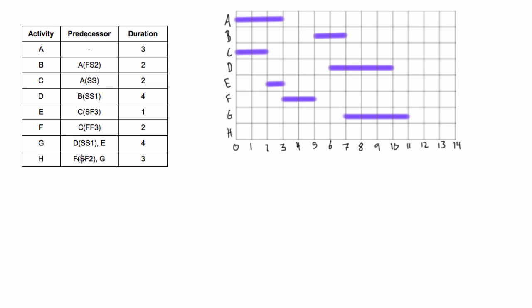Activity H also has to satisfy two things. It depends on F with a start-to-finish relationship of two. So we find the start of F, and H could finish two days after that - so that's one potential finish point, and with three days duration we count back three for one potential start. But H also depends on G with a regular finish-to-start relationship, so it can't start until G is done. Starting before G finishes would violate that constraint, so we start H where G ends, and with three days duration we go from eleven to fourteen.